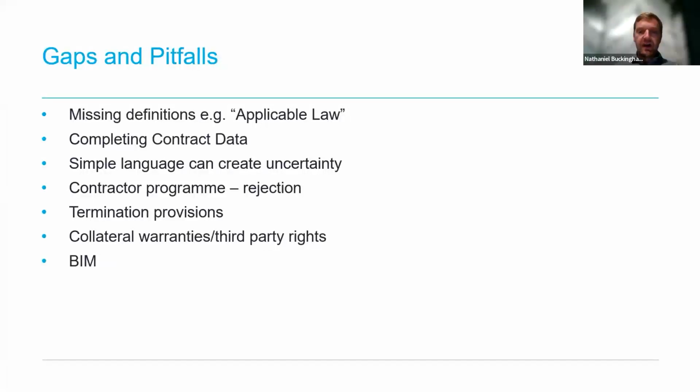The NEC contracts, like most standard form contracts, were not really designed to be amended, and the drafters would really prefer for them to be used unamended. And the changes to NEC4 from NEC3 were intended to bridge the gap with some of the pitfalls identified and some of the standard amendments commonly used by users in NEC3. However, unfortunately, we don't think it does bridge all those gaps, and the practice remains for Z clauses to be used to introduce amendments.